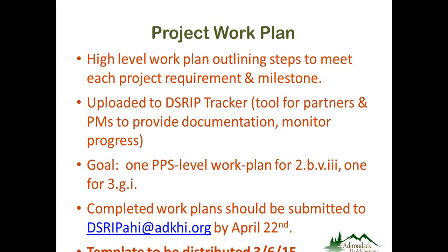What will happen with that work plan is that the steps that are submitted as part of the work plan, each step will become part of the overall work plan that's put into the DSRIP tracker. Some of you saw a demo of the DSRIP tracker at a meeting in Lake Placid. Others haven't seen it yet. But the DSRIP tracker is a tool for network partners and for the project managers to use to look at our status against the requirements and milestones, provide documentation that shows that those have been met, and overall monitor the progress on the project.